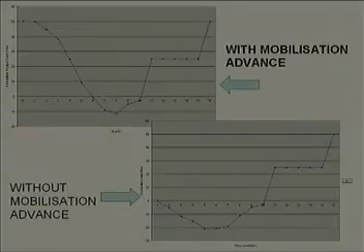Whatever money you require is to be brought in from your own sources. Now, when you are bringing money from your own sources, you are losing an opportunity to invest it in some other option. So, there lies the problem of negative cash flow.